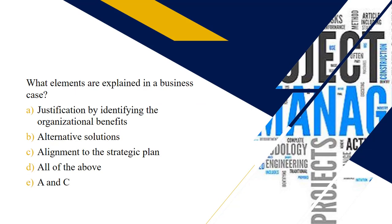Next question: what elements are explained in a business case? Hopefully you didn't get tricked and you chose choice D — all of the above. The business case is a written document or report that helps executive management and key stakeholders determine the benefits and rewards of a specific project. The business case can include such things as justification, alternative solutions, as well as alignment to the overall strategic plan of the organization.